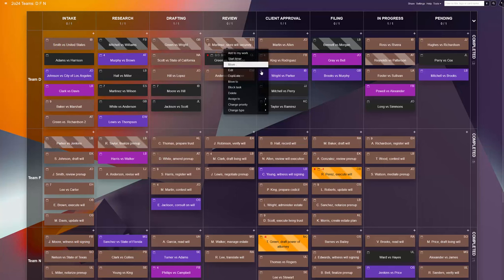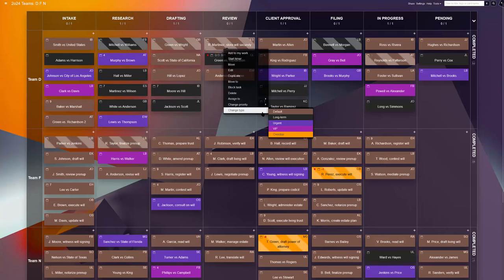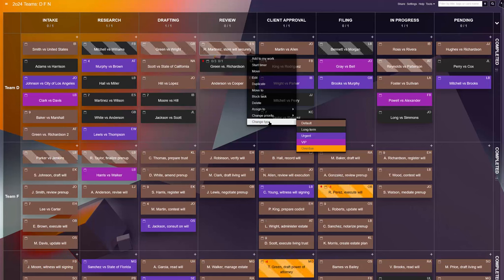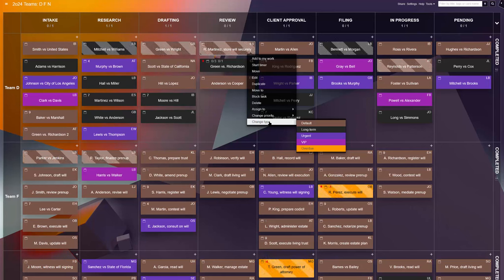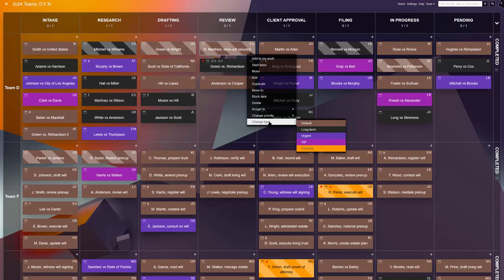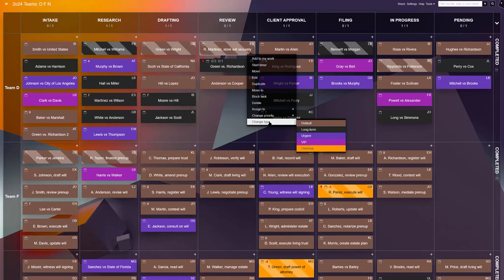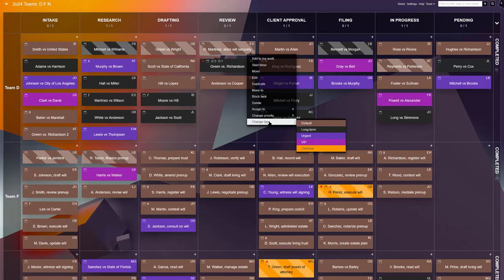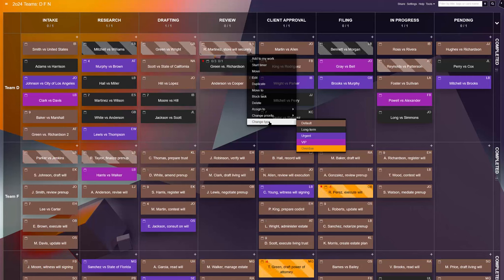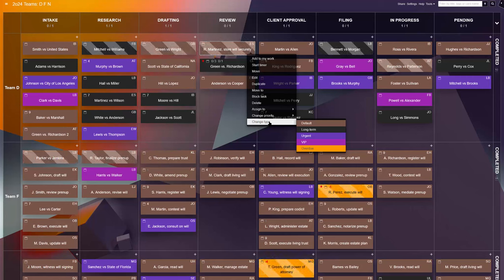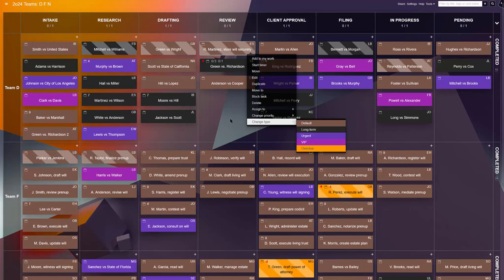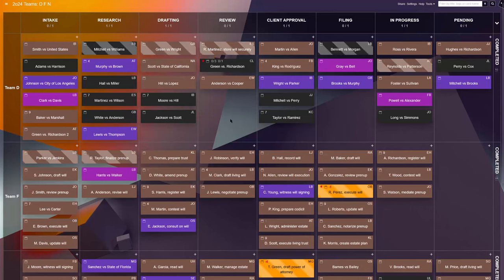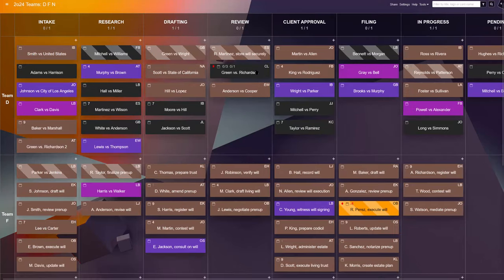To make prioritization easy, the team uses distinct task colors and priority icons to flag task importance, urgency, and nature. As such, regular cases get a brown color, urgent cases are purple, long-term ones are signaled with black, with a separate fuchsia color for high-profile, high-value cases.